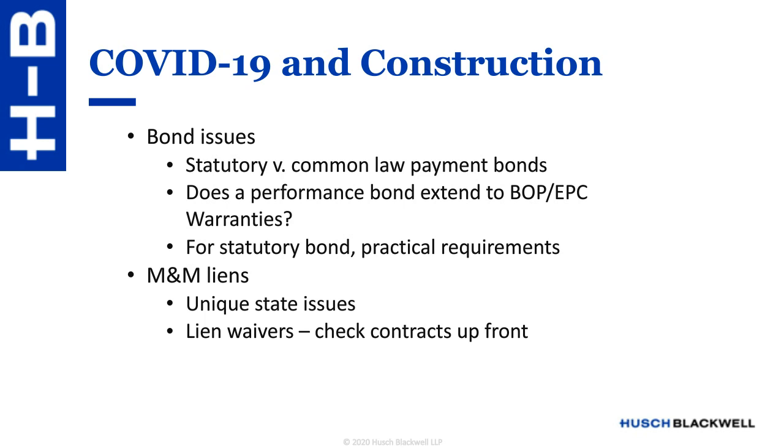Also, on the practical side, if you are dealing with an upcoming closing and you want to make sure that any lien claims are not affecting the real property, then if you're in a state where that could be the case, you have to absolutely follow the statutory requirements. And if you don't, the title company might not recognize that bond as serving the purpose that it should.